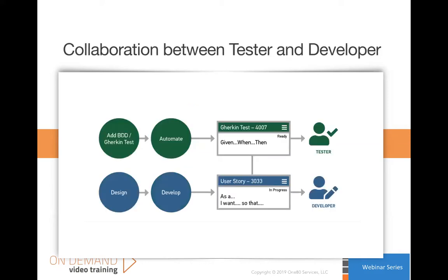The developers and the testers then work together to define the acceptance criteria and acceptance tests so that the developer knows how they're going to be tested, so that they write just enough code to pass the test. We're trying to get the developers to write solid, substantial code that provides the simplest amount of value one increment at a time. We don't want the developers to gold plate stories.